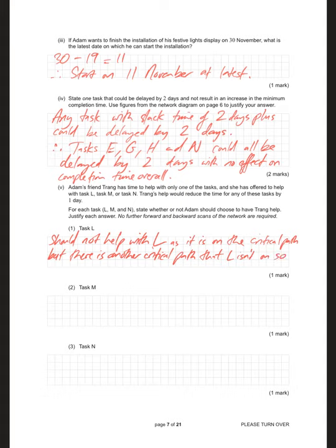So the other critical path would apply if L was shortened, therefore no overall effect on project.